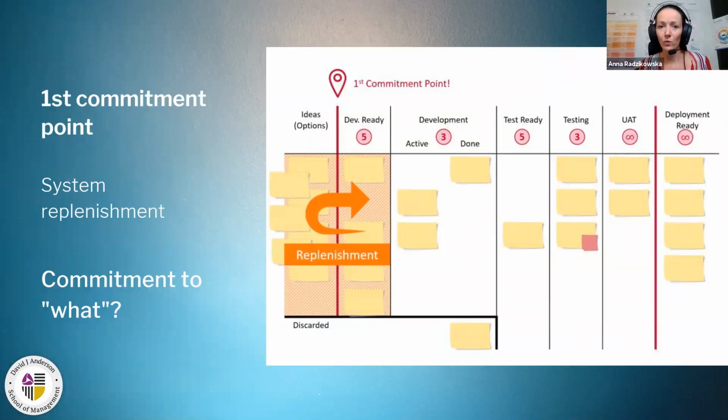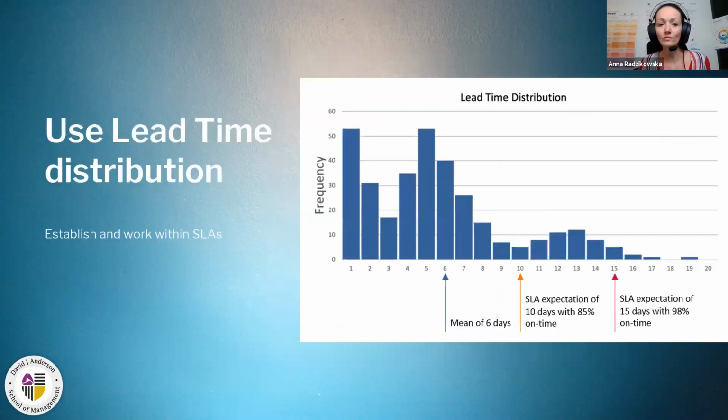So now we are here in the first commitment point. We have our replenishment meeting. We decided, okay, this is the report that we are going to deliver next. And stakeholders ask, okay, and when it will be done. And for this, we use the lead time distribution.